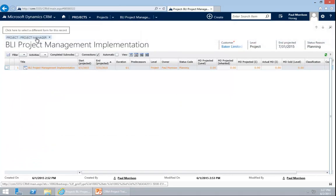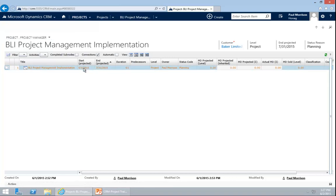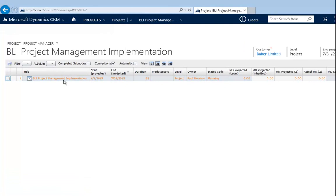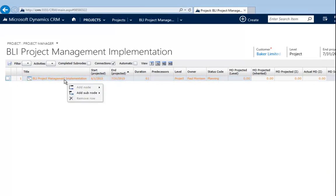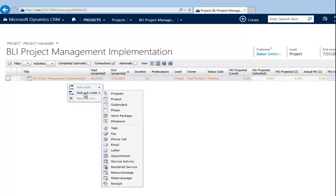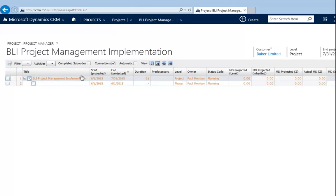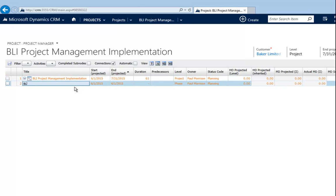You see the work breakdown structure in Silverlight. It is all information you have on the project charter as well. So you see the title, start, project end, and so forth. To now create the further structure, like phases, subnotes and so on, all I do is right click on the node and context menu will open and you can add subnotes. So for example, you can add a phase. I am going to add the phase conception, click out of it and it is created.